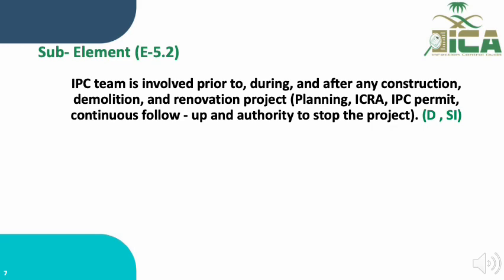Sub-element E.5.2 states that the IPC team is involved prior to, during, and after any construction, demolition, and renovation project — including planning, ICRA and IPC permit, continuous follow-up, and authority to stop the project. This sub-element is evaluated through document review and staff interview activities.